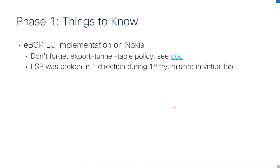When we did the first interconnection, we found some issues that didn't go as planned, especially on SP1's side. The ASBRs on SP1 side were Nokia, and on Nokia you have to make sure you don't forget to implement a configuration called 'export channel table policy'. It's mentioned in their documentation — that configuration is present to stitch LDP to BGP label unicast, and if you don't have it, the LSP will be broken. That's what happened during the first try. Unfortunately this was missed in our virtual lab because at the time we didn't have Nokia virtual machines available.